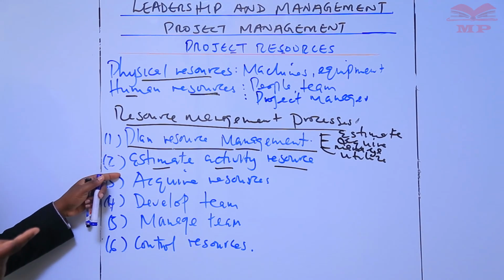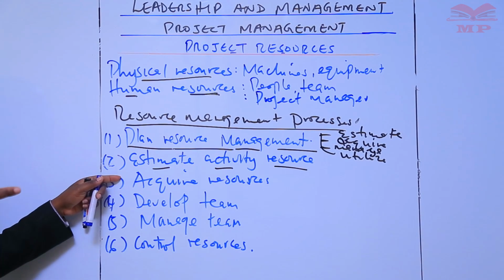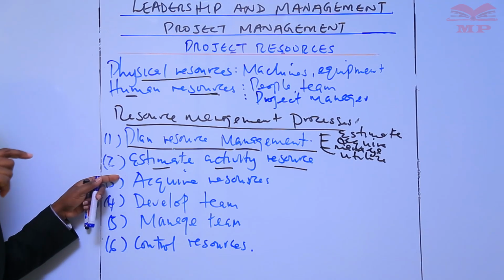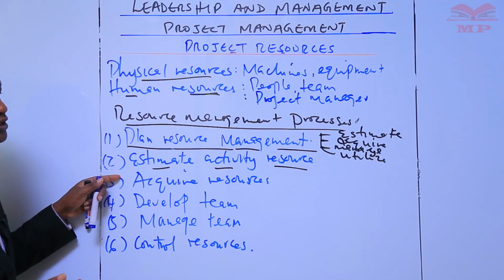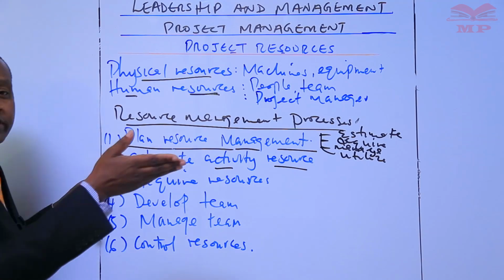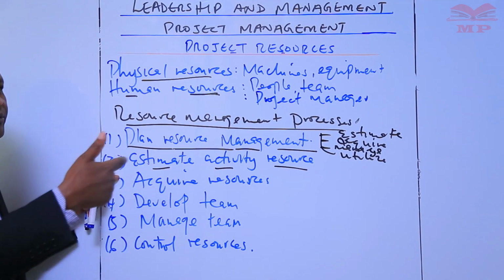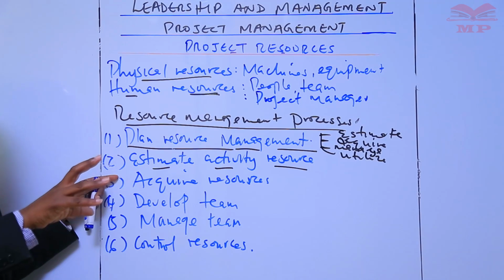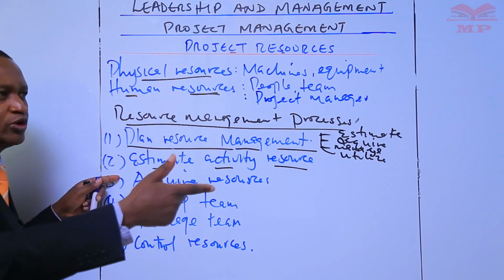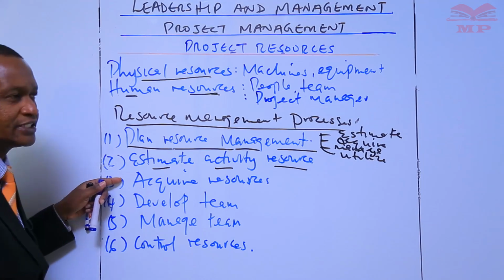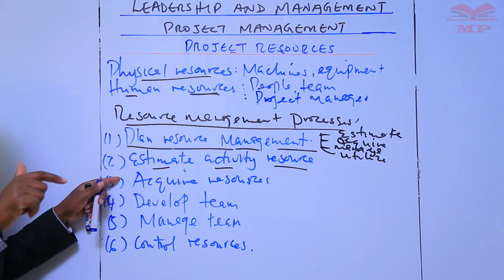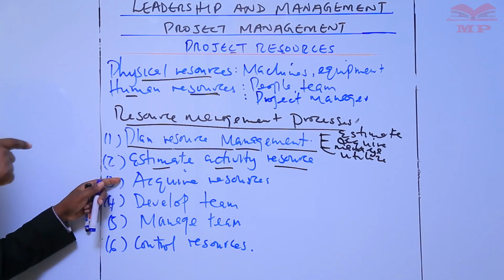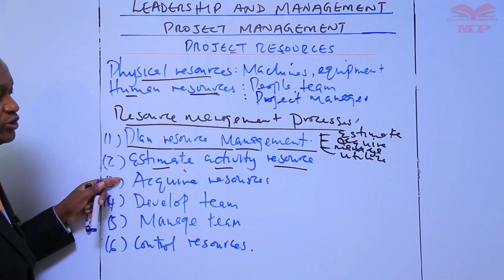For example, a construction project team will need to be familiar with local building codes, and such knowledge is often readily available from local sellers. So if the internal labor pool lacks experience with the unusual or specialized construction techniques, the additional cost for a consultant may be the most effective way to secure knowledge of the local building codes.